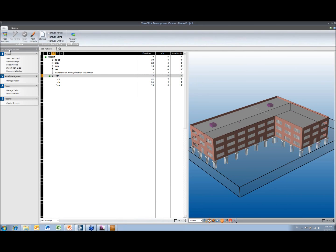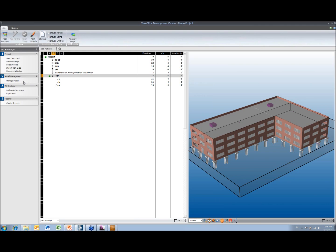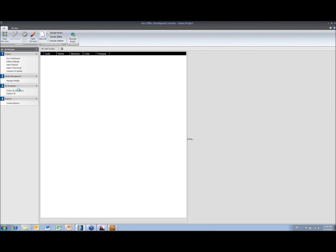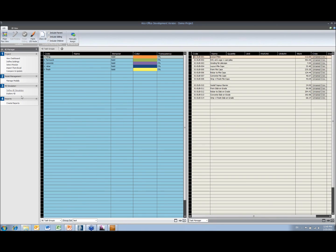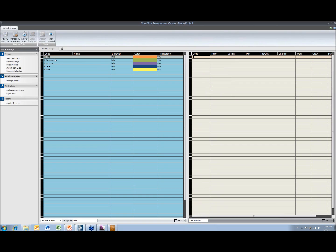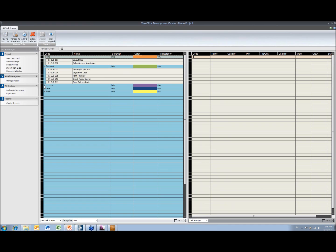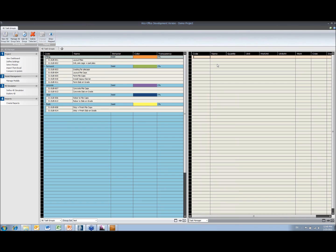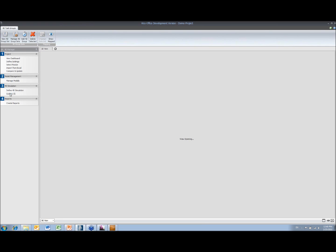And then, once we're happy with that, we can establish the 4D. So here I've already got some groups set up, and we just allocate the different tasks to the different groups. So they're just dragged and dropped from the right-hand side to the left, and then we can explore.